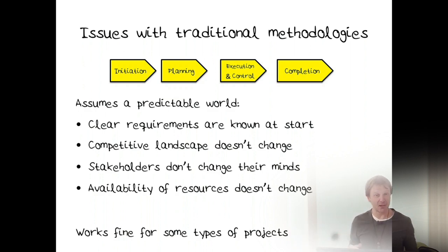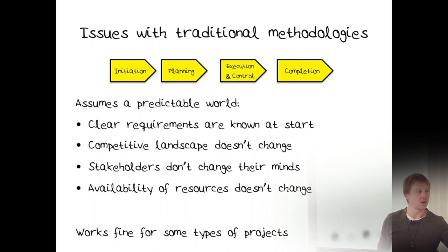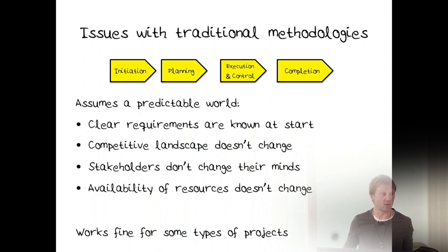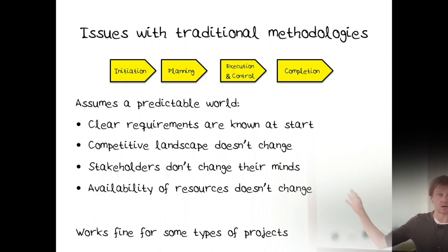But guess what? If we're doing a new project and the bread and butter operation of our business goes down, like our main product goes down, they're going to take the best resources and throw them at that problem. Because if we don't get that system up and running again, we cannot meet payroll next month. So that's way more important than the project you started. Resources will change. It's just the nature of the beast. This might work fine for some projects. I don't know. I haven't seen any projects where this way of doing things works.